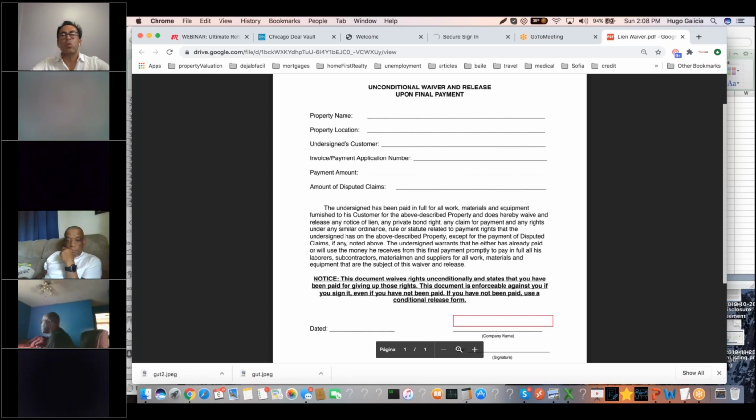So this is what it comes down to. Many contractors, let's say if there's a dispute for whatever reason, put a lien on your property. So people or investors just freak out, right? And that's a way for contractors even to blackmail or manipulate investors. Don't let that happen to you, because a lien is only good for up to 2 years. Then the contractor needs to file for foreclosure to make that effective. Otherwise, it's going to go away.